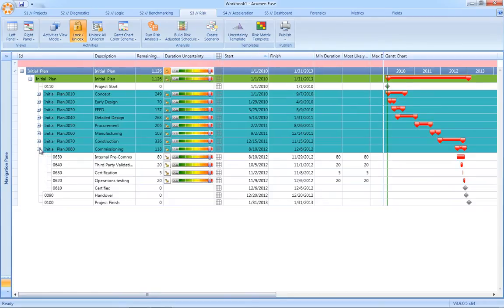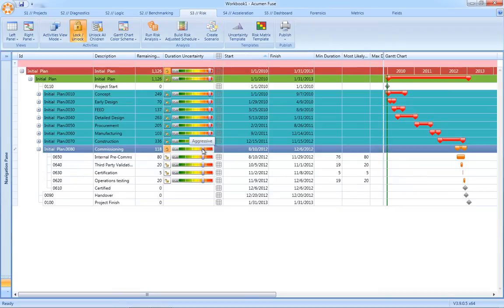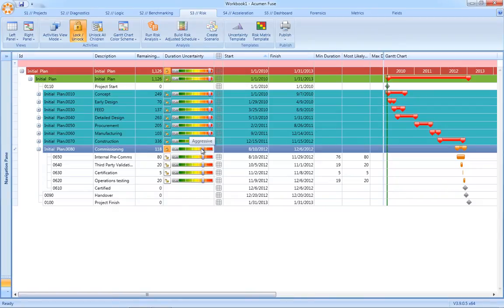If we just expand the schedule, you'll notice that as we apply the uncertainty factor at the parent level, the children activities inherit the same uncertainty factor. So the net result is we can risk load a schedule very quickly.